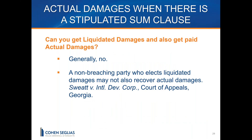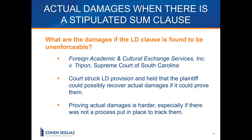Can you get liquidated damages and also actual damages? Generally no, because that would violate the principle that courts won't give windfalls. A non-breaching party who elects liquidated damages may not also recover actual damages. If the LD clause is found unenforceable, the court may allow proof of actual damages instead — as the Supreme Court of South Carolina held in Foreign Academic and Cultural Exchange Services, Inc. v. Tripon. The problem is that proving actual damages is harder, especially if no process was put in place to track them.